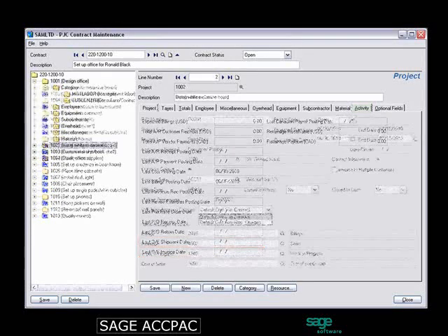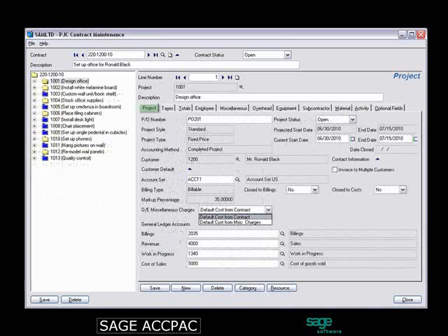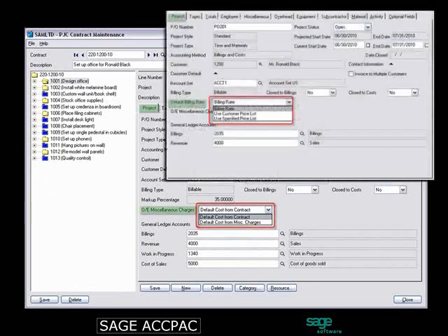information. Two new options on the project maintenance form let you set default methods for calculating costs and billing amounts on job-related documents you process in order entry: the OE miscellaneous charges, and also the default billing rate. Decide whether to record costs and charges in order entry. You can now record related non-material costs in order entry as miscellaneous charges. Order entry then sends both costs and revenue amounts to Project and Job Costing. You can also process job-related item costs on sales orders in order entry, as well as on receipts in purchase orders.